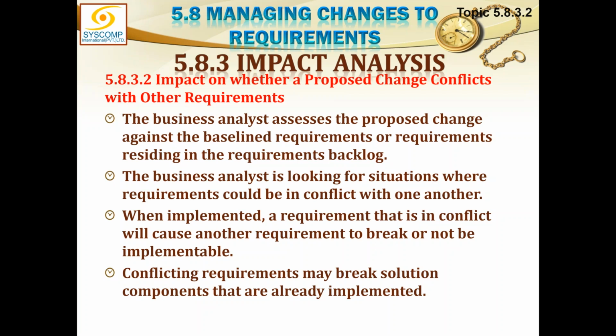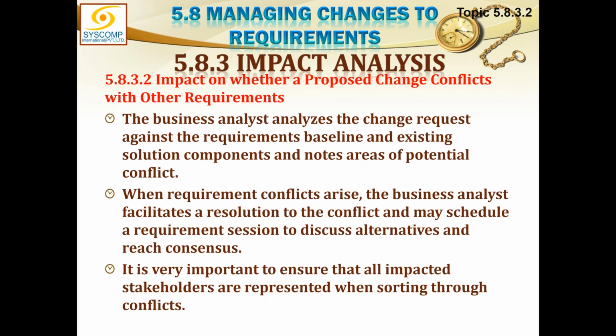Conflicting requirements may break solution components that are already implemented. The business analyst analyzes the change request against the requirements baseline and existing solution components and notes areas of potential conflict. When requirement conflicts arise, the business analyst facilitates a resolution to the conflict and may schedule a requirement session to discuss alternatives and reach consensus.